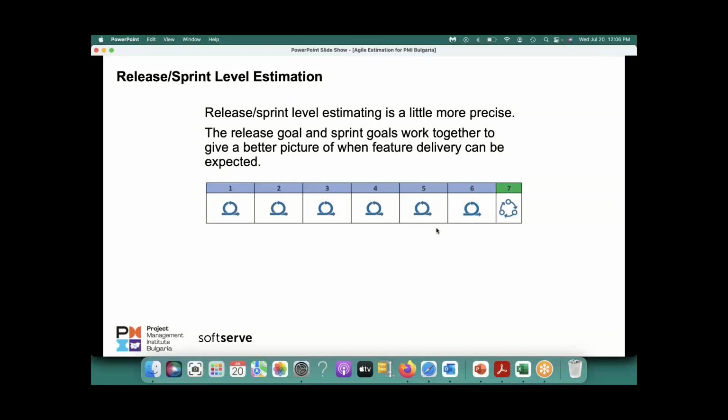Okay, so this chart you see is, in release planning, what you need is how many releases are going to be there, what you are going to put in each release, and each release may coincide with the roadmap milestone, or maybe for a roadmap milestone there could be more than one release. So let's say there was a roadmap goal every quarter, you may have 3 releases, or you may have 1 release, or you may have 2 releases, whatever. It just depends upon how you plan.